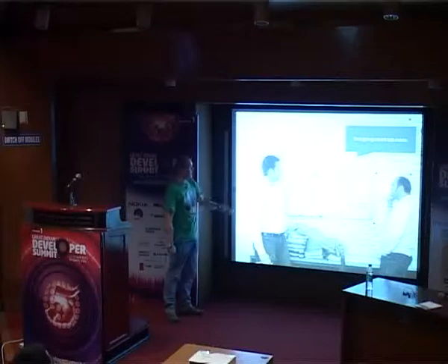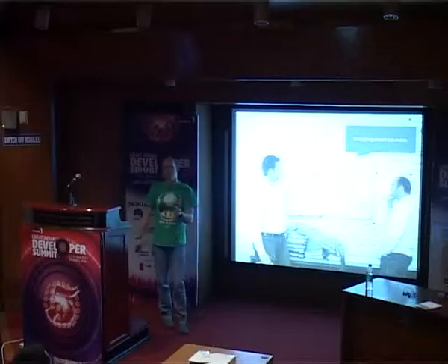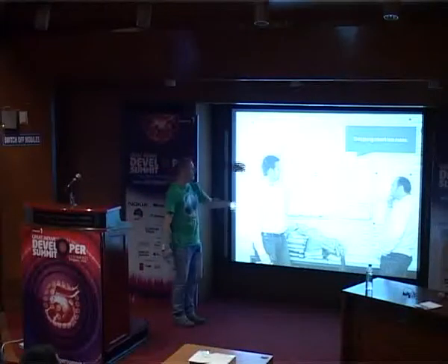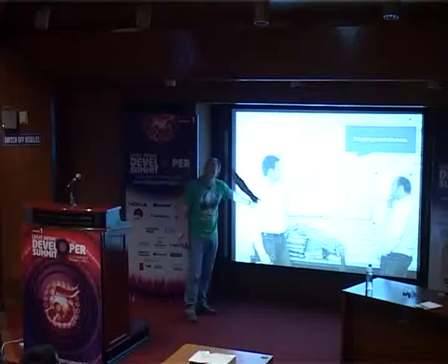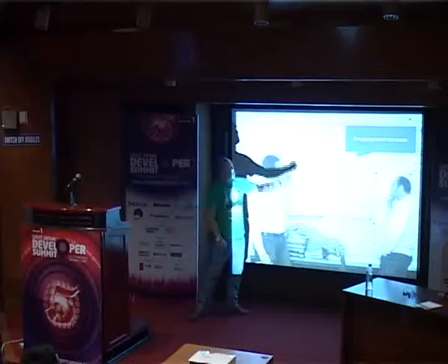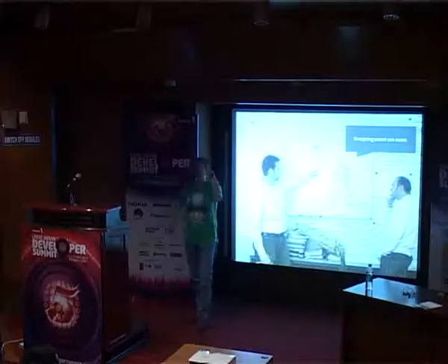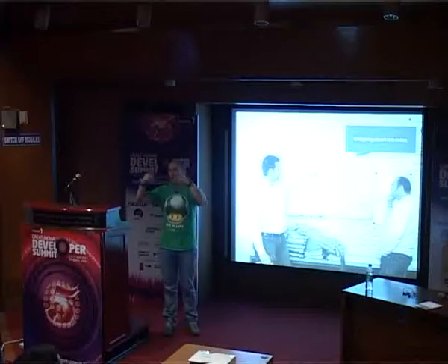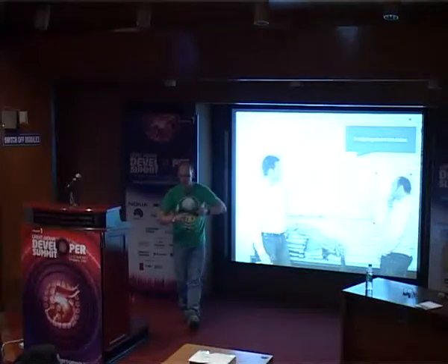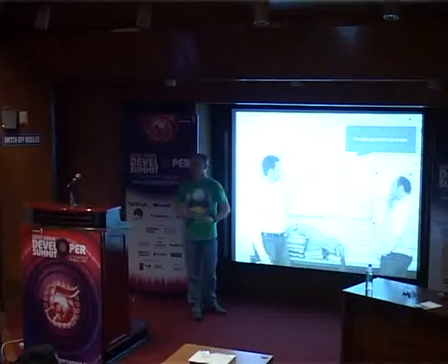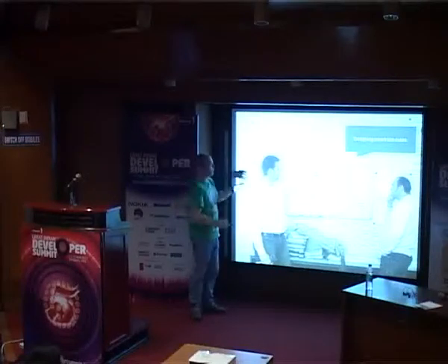And this is an interesting picture because in the design, you would expect there to be designers or information analysts. In this particular picture, which didn't contain the whole team, by the way, this is the tester in the project. Why is he in the design session? Well, because he has to look at the different scenarios in this particular use case, and he can actually look at the exceptions. And if you look at the exceptions before you start building this stuff, it will save you a whole lot of time, and your quality will improve very fast.